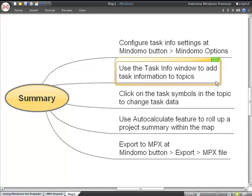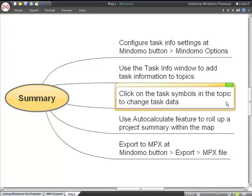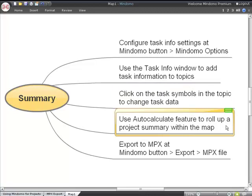Once you have task information in the topics, you can click on the task symbols to change the data. If you enable the auto-calculate feature, it will roll up a project summary of the topics underneath the selected one inside your map...